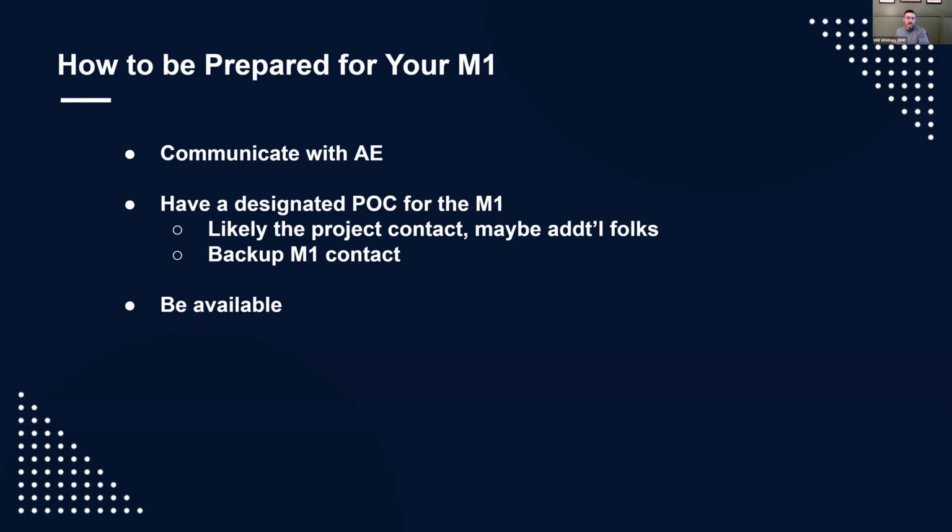But even if they say that's it and we deliver that and say perfect, you probably want to actually test it, just to confirm, because it's kind of a bummer for everyone if we go through and finish everything and then you say, oh, I need you to tweak this and can you just change it to this now? Well, sounds easy, but a lot of times from our side, it's almost a whole project in itself to redo something, or just a small tweak here or there really affects production. So we don't want to get into the back and forth of, oh, now we have to charge you this, it's a whole new product. But it really is. It becomes a weird thing.